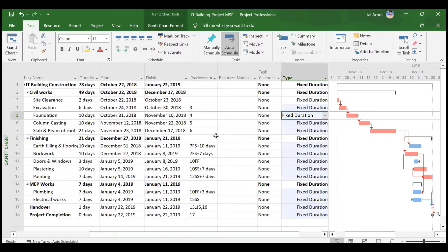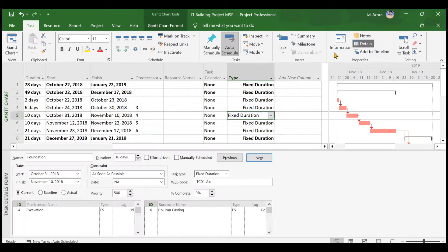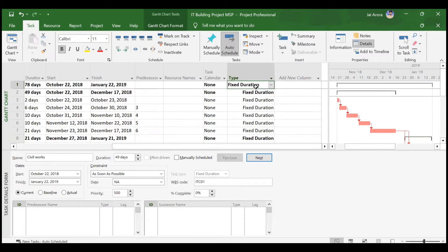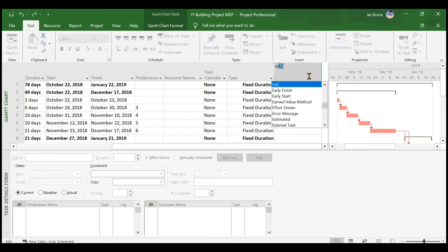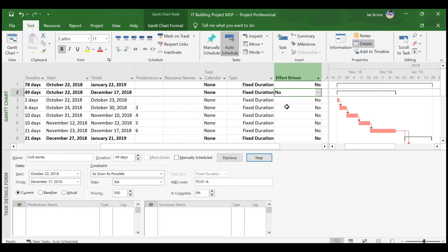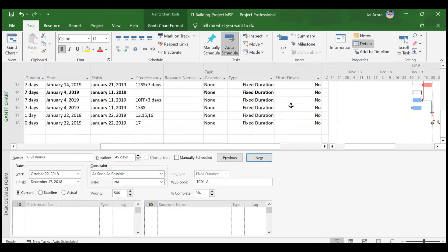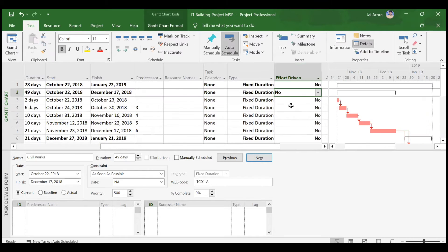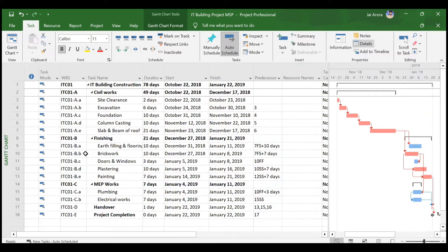One more thing: we should verify that no activity is effort-driven. We will open the details tab and confirm that no activity displayed is effort-driven. You can also add the effort-driven column to check. Now we are ready to assign our resources.